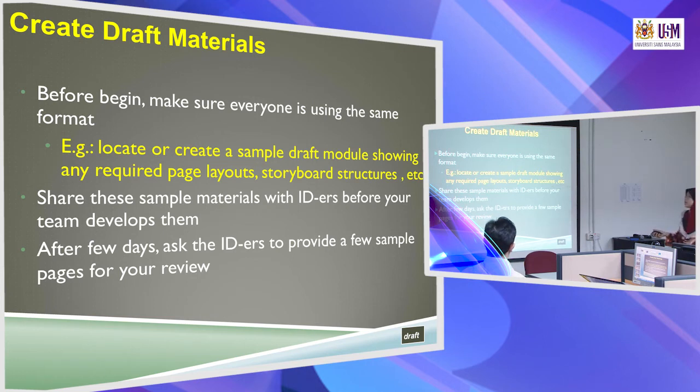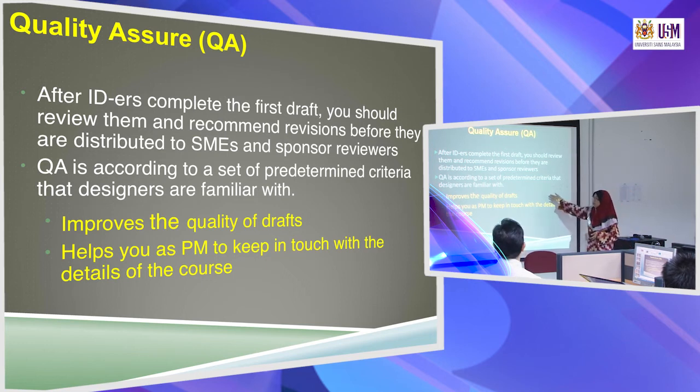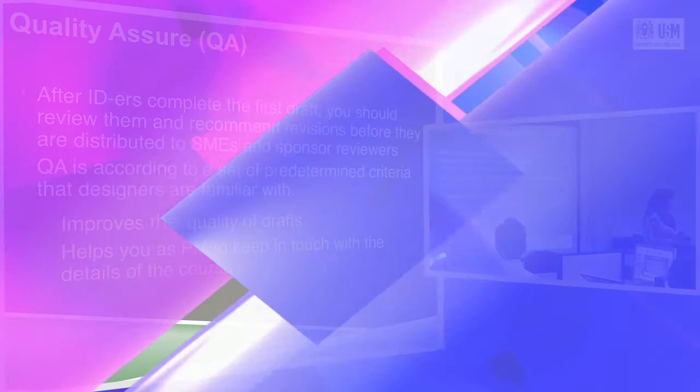After a few days, ask the instructional designer to provide a few sample pages for your review, if you are going to include an instructional designer. After instructional designers complete the first draft, you should review them and recommend revision. Again, still revision. You have met, I think, more than 5 times for your meetings, and you are still revising whatever you do. Before they are distributed to SMEs and then sponsors to review. If you see our first slide just now, I don't know how many times we reviewed. We review and we revise. Lots of revision. And quality assurance is according to a set of predetermined criteria that designers are familiar with, to improve the quality of the drafts and help you as project manager to keep in touch with the details of the course.